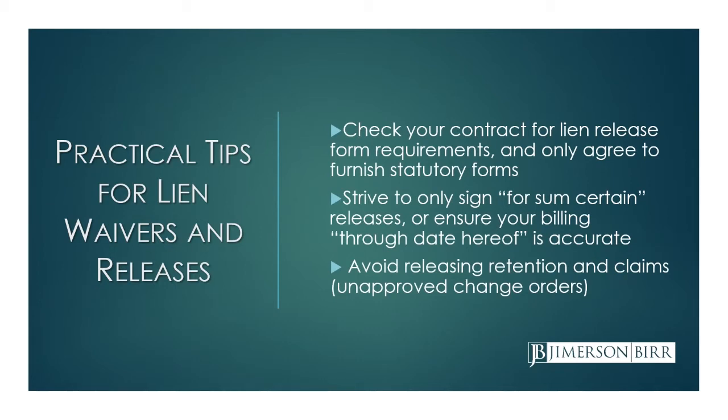And again, strive to only provide the sum certain type of release. And if you do have to provide a through date release, make sure that your billing is accurate and that you've included all costs through that date in your billing. And pay attention to any unapproved change orders or retainage that you haven't billed for yet but incurred prior to that date.